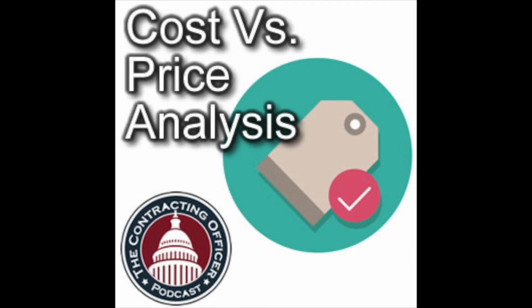The amount of cost data that is requested for competitive proposals is stunning. And it's not necessary. A lot of times when I asked for cost data, I was really opening up questions. Once I see behind the curtain and see how the pricing is built up, now I start asking questions. And in reality, I don't care. I shouldn't care about how that price is built up as long as it's a fair and reasonable price at the end. So it ends up being a distraction. And I didn't see it that way when I was a CO. So if you're going to get competition, use that to judge how much cost data you actually need.